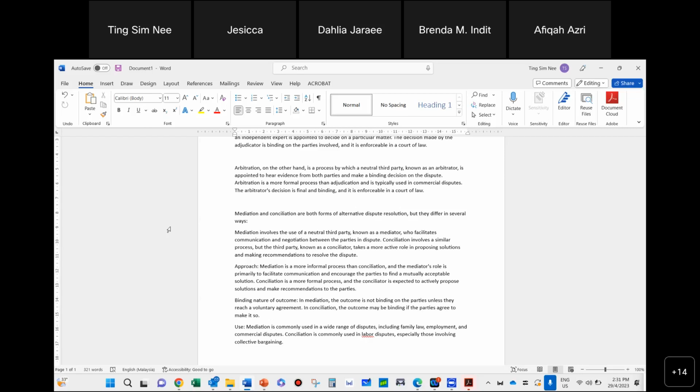It's a terms usage. It's not so much of who is right or who is wrong, or any books that are wrong, or any information that is wrong. It depends on the sources of the country talking about mediation or conciliation. So like I said, the PAM form calls for mediation. The PDB form calls for mandatory conciliation. Mandatory mediation. So I hope you guys understand this process.